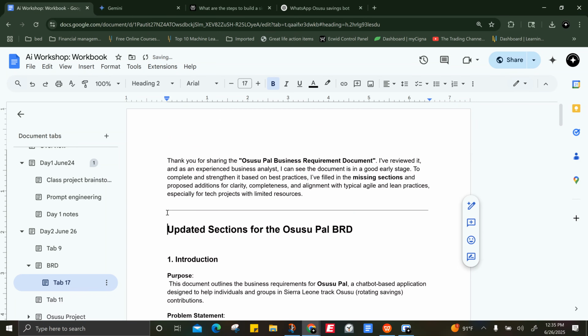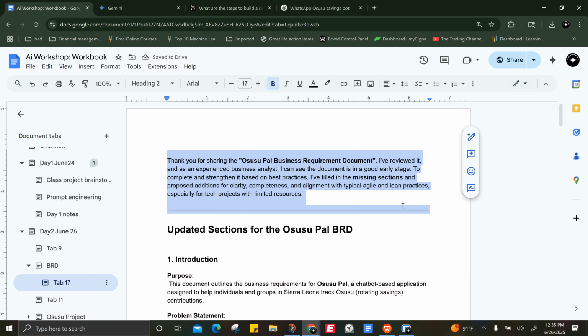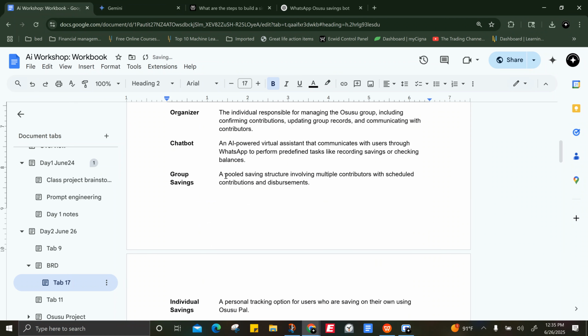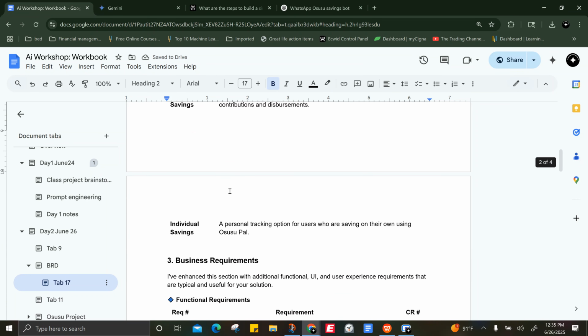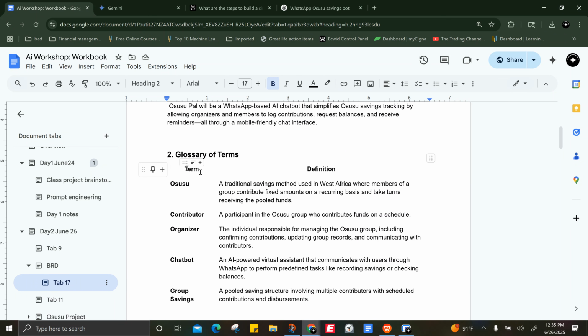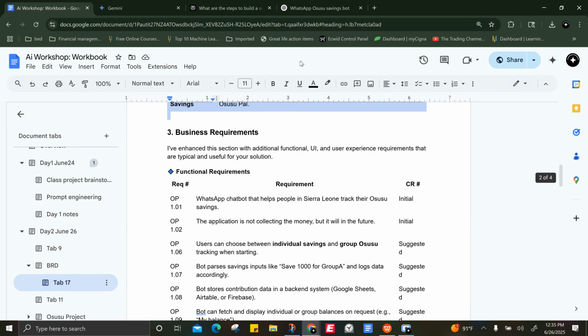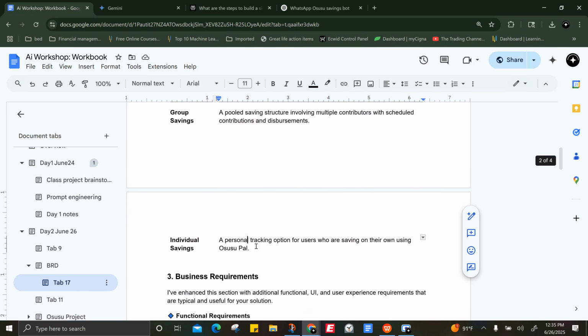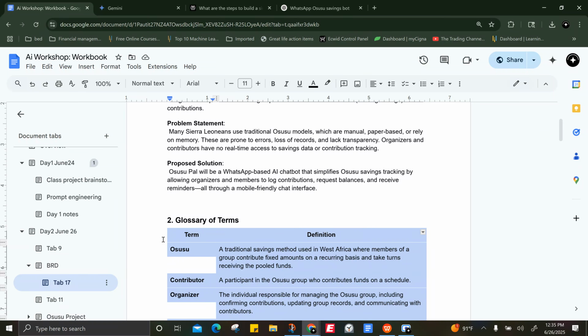And the good thing with having a requirement document is that it's something to agree upon. When we're building, we have something that's defining the application. That way we don't say, oh, let's add this, do that. It wasn't defined here, so no. Because that happens a lot with projects, even major ones. People want to add things because they forget. With AI, I guess the process probably changed, but traditionally, it takes time to go back and change things too.